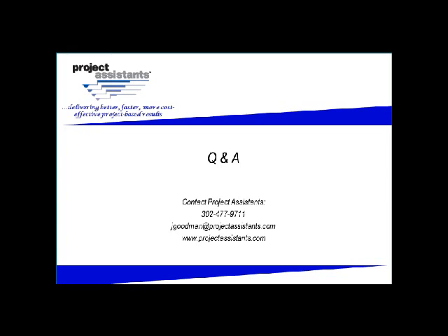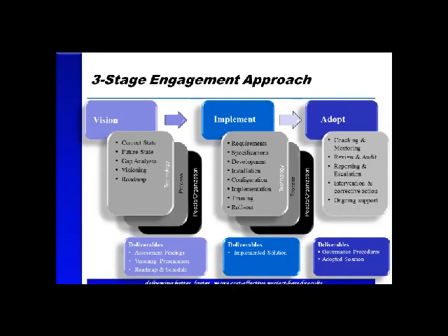If we had a proposal, for example, a three-stage proposal with planning, provisioning, and implementation and adoption, you might see maybe four or five months' worth of effort to do all that. The dashboard part of it is actually pretty small. In a four or five month effort, it's probably two to four weeks, depending on the level of the dashboard. So the creation of the dashboards themselves is pretty straightforward.